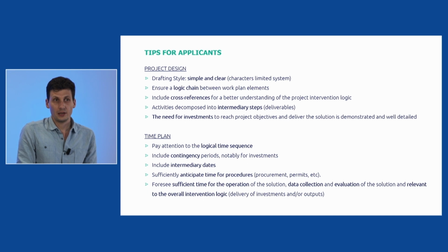When it comes to the time plan, pay attention to the logical time sequence. As I was saying, for the thematic work packages, and for the activities in these work packages, you are free to set up the start date and the end date. So make sure that it is actually well logically sequenced. Make sure to include contingency periods, and especially for the investments. Include intermediary dates. That's what I've already asked from you in the deliverables.